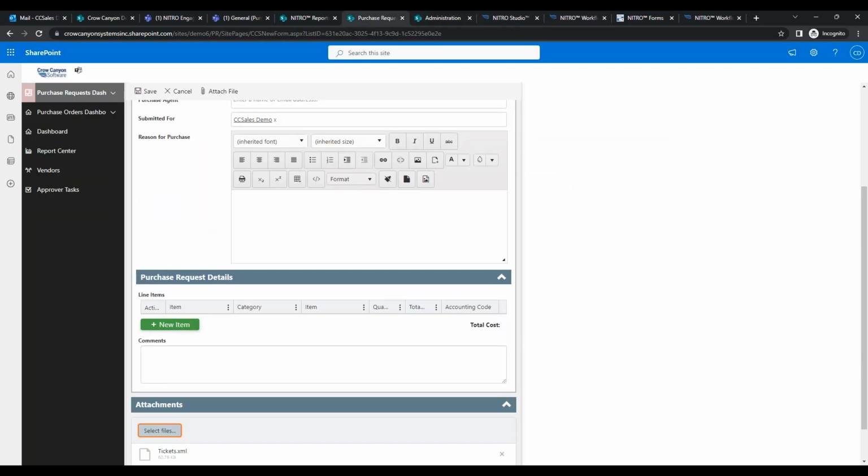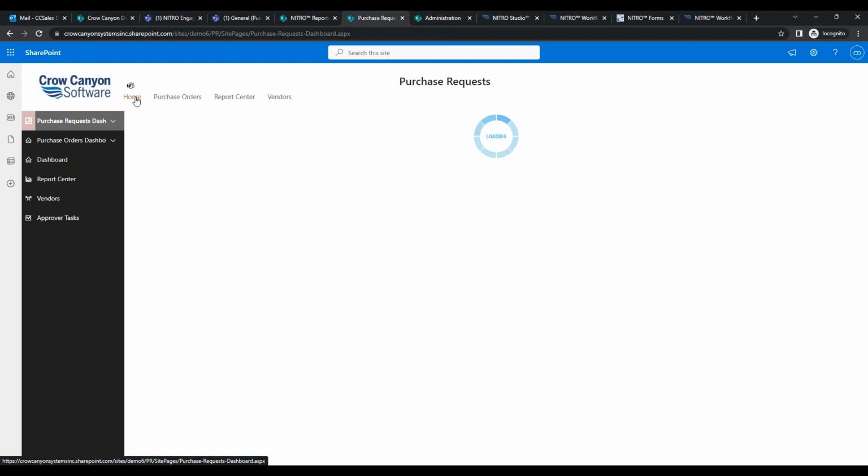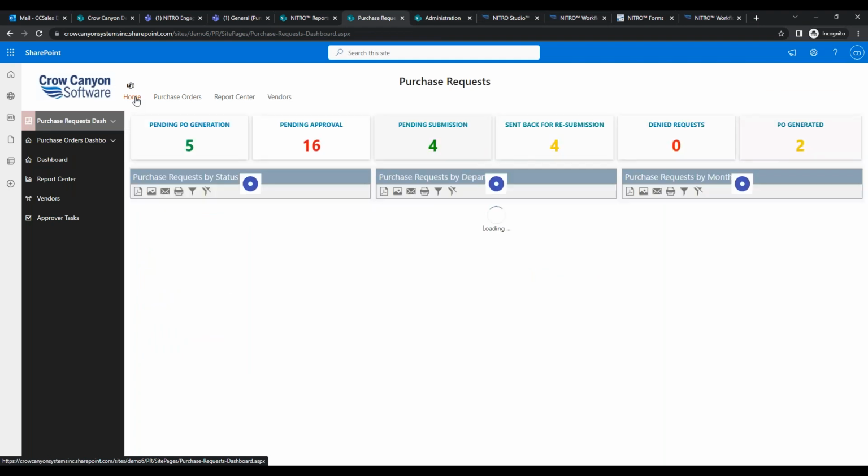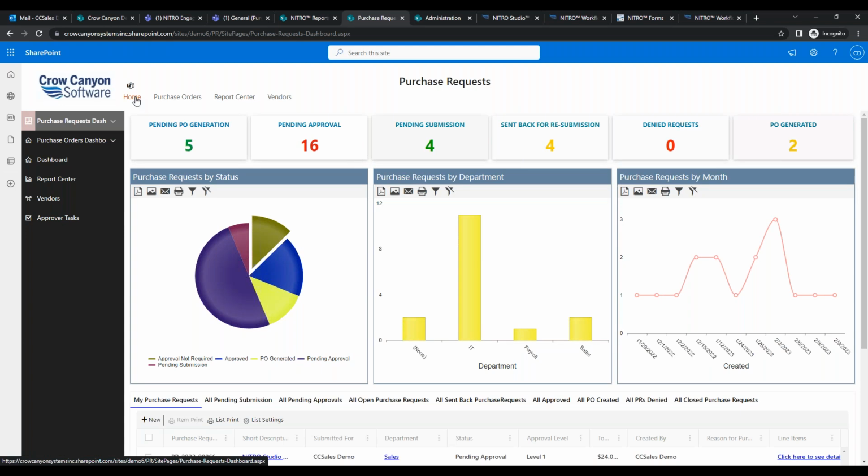Right. There's a lot of that communication back and forth when we pass information from our system, such as who requested it or who's responsible for this purchase. Mm-hmm. It usually happens once it's approved. So there are two elements to this purchase request. First, you have to get the thing approved. Some are self-approved, say you have authority to buy anything under $1,000 or $10,000 or something, and that doesn't need approval. That process is in there also. But if it does need approval, it goes through the approval process. Then it's like, okay, now we're ready to order it, put it into procurement or however it's ordered, and then the communication back and forth with the vendor starts to take place. Right.